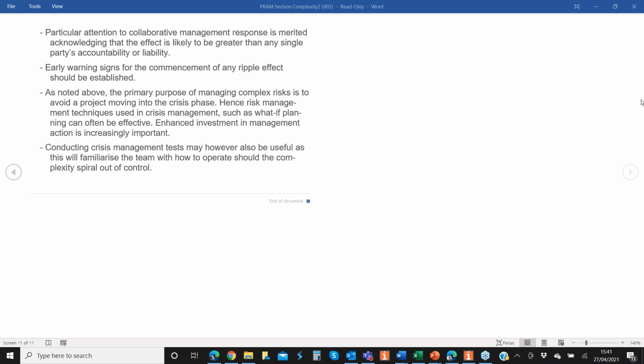Is that more portfolio management at all? It's proportionate to length, isn't it? If complex projects have an attribute that is length of time to deliver, then those have a greater likelihood of not only suffering from change but also becoming dislocated from later business drivers. I'll take the example of High Speed 2 and the phase 2 work that's going on, where benefits are being assessed as you go on. That's changing quite a lot lately, which one's being prioritised, and which one provides value for money.